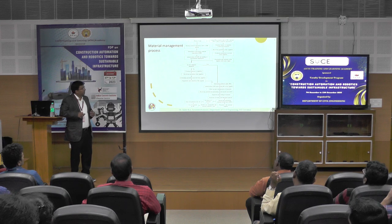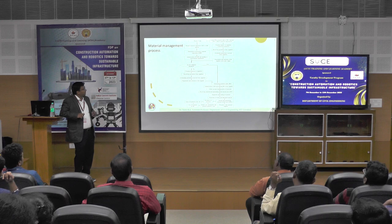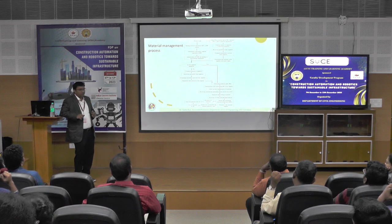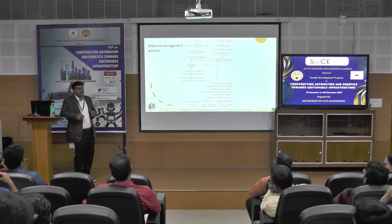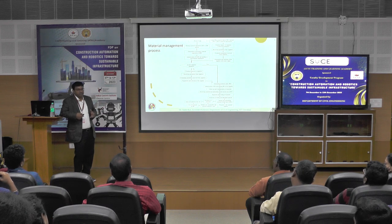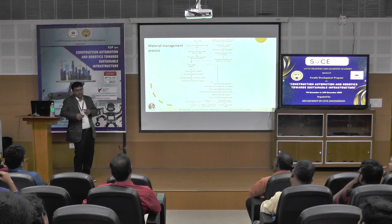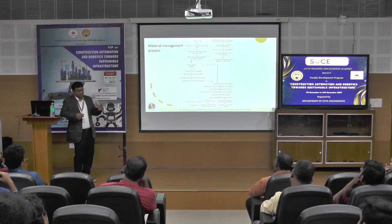In the existing system, the material planning module is not incorporated. That is why project people often say materials are urgently needed. Since material planning is not integrated, they do not know when materials are actually required. Different departments — planning, procurement, and execution — work independently with a lot of miscommunication. The planning team has the construction schedule but lacks supplier and lead time information, while the procurement team has supply-related information but is disconnected.